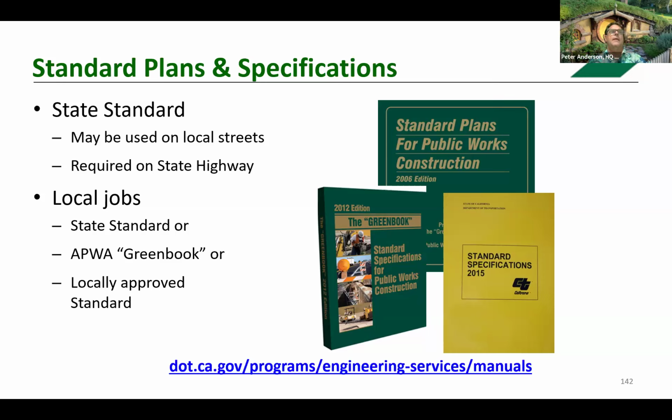Locally approved plans may not be used for those, but they can be used, local standard plans can be used for any project that's off the national highway system. So locally developed standard plans especially may be used. I think it's important to note that locally approved standard plans are not ad hoc plans.